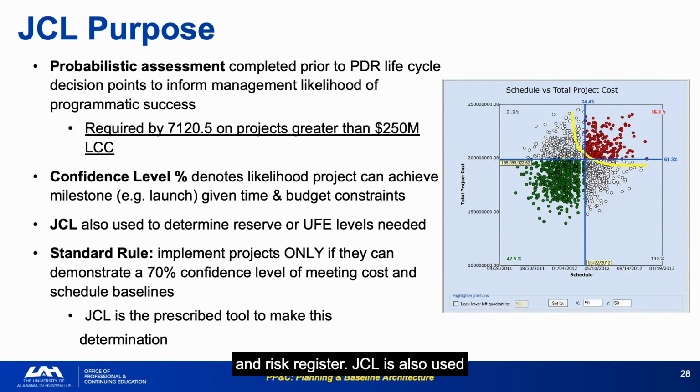JCL is also used to determine reserve or UFE levels needed. This is the sizing function. Programs that size their UFE based on rules of thumb rather than JCL output tend to be either over-reserved, wasting budget, or under-reserved, underfunded for their actual risk exposure.